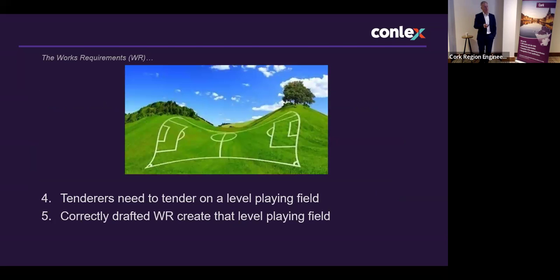This is a playing field which is all over the place, as you can see. The reason I put this particular picture here is that I see one of the reasons for the works requirements is to create a level playing field for tenderers when they're tendering. You know, the works requirements, including the drawings and the spec, need to be clearly defined. They need to clearly define the employer's requirements. There should be no confusion as to what the contractor is being asked to tender for. If you have a poorly drafted set of works requirements, the playing field will be all over the place.